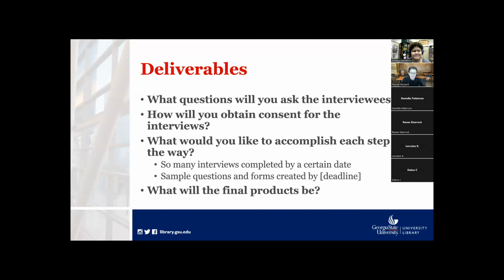What do you need to accomplish for each step of the way? If you have a certain date that is your deadline, you need to start planning backwards. How am I going to get to that deadline? And I will tell you from many years of experience, you need to provide a big buffer in that time frame, because Sod's law is that if you're interviewing five people over five weeks, at least one of those people will postpone, or something will happen, or the equipment won't work, or suddenly, out of earshot, a child has an accident and they have to say, sorry, I need to cut this short, I have to go. Something will happen. So you need to give yourself plenty of time to get to your deadline, if you do have a deadline.